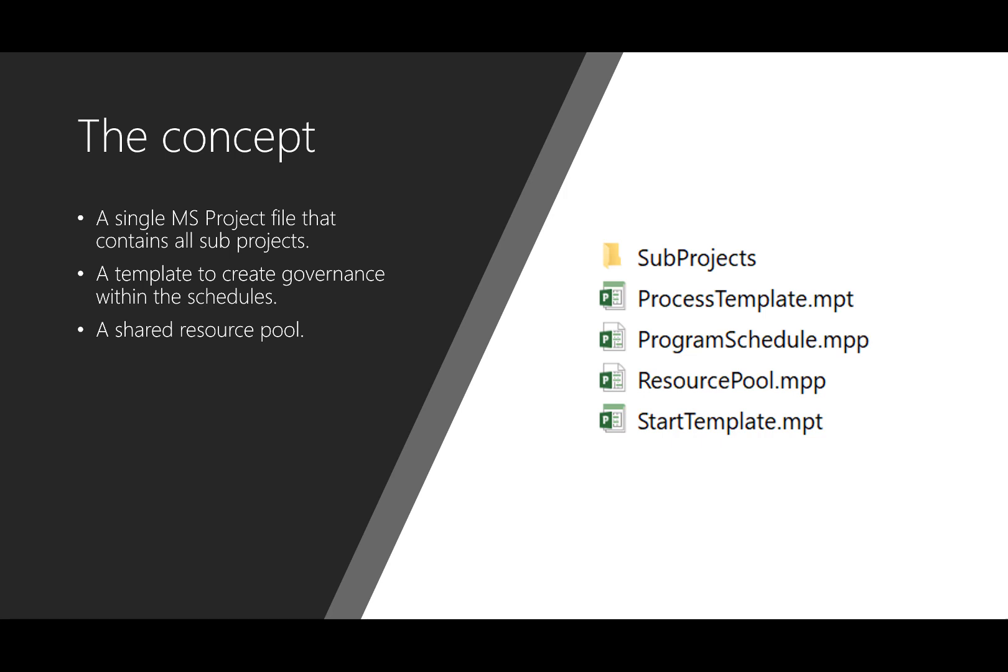So on the right side you'll see the files that we're going to create. We're going to create a subfolder with all the subprojects. We have the process templates, we have start templates, we have a resource pool, and then we have the program schedule which contains every project that you're going to create for that program so that you can manage that from one single location.